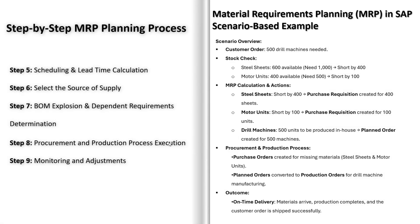Next, SAP calculates lead times and basic dates for the procurement or production process to ensure materials are available on time. Lead time calculation refers to the time it takes to procure or produce materials — lead time for external procurement considers supplier delivery times, while lead time for internal production considers production and setup times. SAP uses these calculated lead times to generate scheduled dates for when materials should be ordered or produced, ensuring materials arrive just in time for production to start.